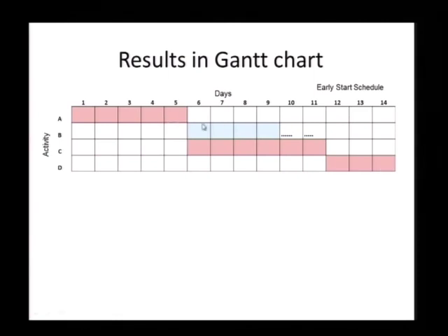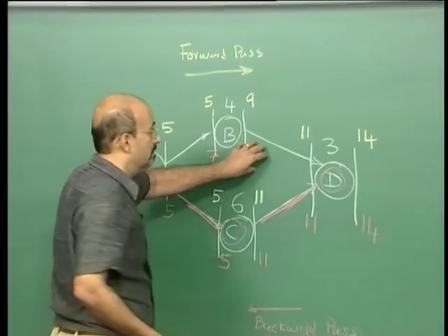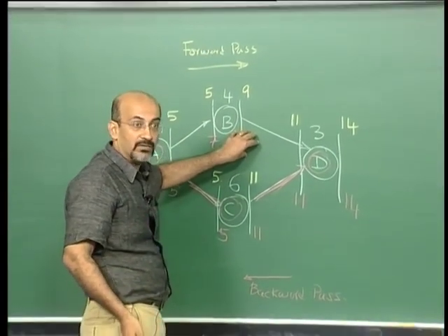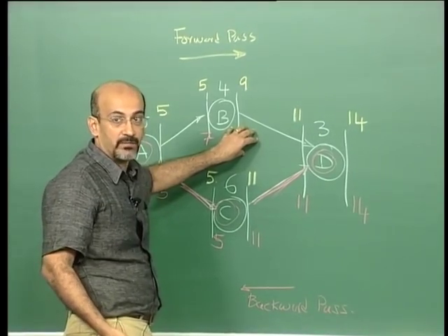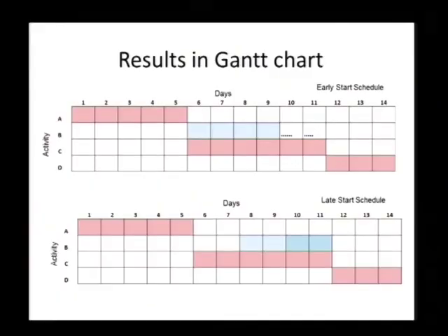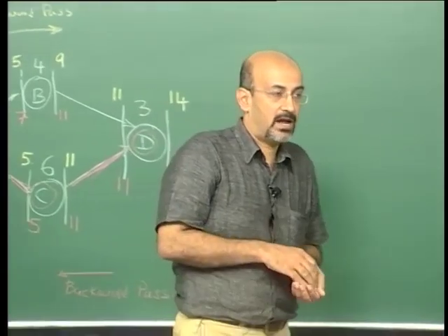Okay, now we have seen that this is what we call the early start schedule. Now if I go to the late start, what happens? Yeah, so I can move B, the only thing I can do when I move to late start is to move B all the way to 11, and if I move B all the way to 11, the project is still okay.